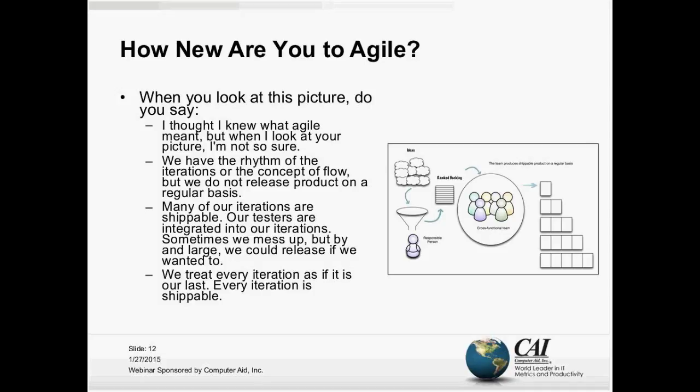You can say, let me explain this picture for a minute. Ideas come into the organization. Somebody who's a responsible person takes all of those ideas and creates a ranked backlog. The ranked backlog goes into this cross-functional team, and then periodically, I like every other day or so, the cross-functional team finishes complete work. Right, so you can finish one small thing and then another couple of small things. You keep adding to that finished complete work.